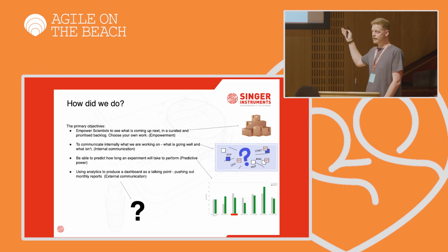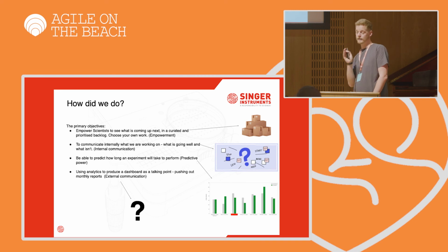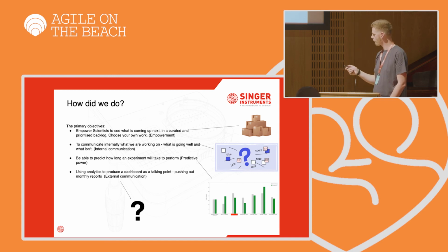We could start to predict how long these experiments were going to take and start to predict into the future. So if somebody comes to us and says, look, this is really important, you have to do this experiment right now, how long is it going to take you, we had a basis at which we could talk about that. And it wouldn't just be, it's going to take you 30 hours, see you later. We could actually start to talk about how hard this thing was relative to other things as well.